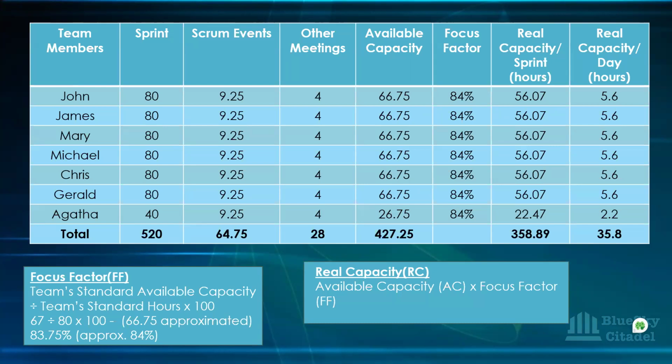So if Gerard is a senior developer that we need, and that capacity has been in place, a product owner might be looking at the situation where, oh, we need this thing, the timeline for this thing is maybe August. Gerard is the one that has the domain knowledge to be able to do this. Do we want to do it earlier before he goes on holiday? Because we know that come summer he goes on holiday and we don't want that time to miss the timeline. So he can actually work on it and finish it before he goes on holiday. These are the kind of things that your capacity could help the team to plan ahead.